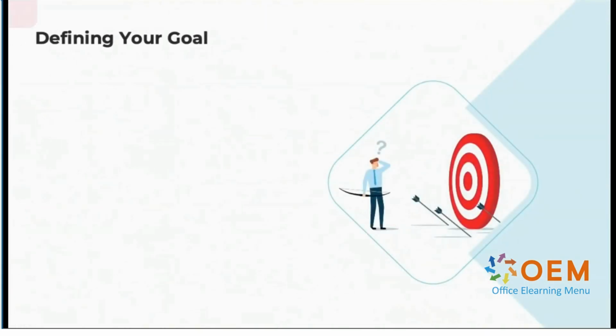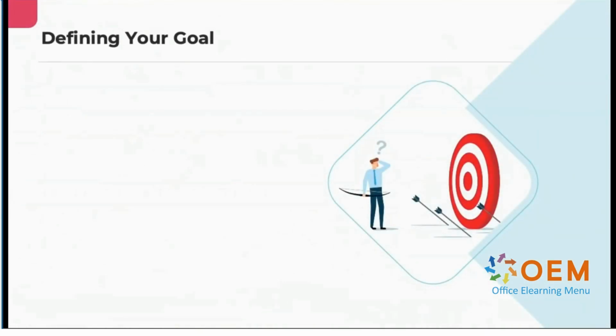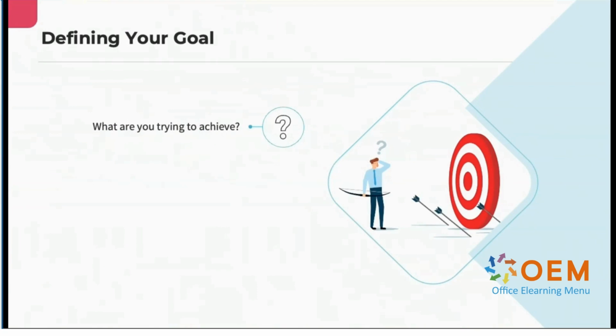One of the hardest parts of impact mapping can be getting started. To do that, you need a business goal. This might sound easy in theory, but in reality, it can be difficult to define just what you want a product to achieve from a business standpoint. This is not the time for mission statements or generalities, which have their place but are not specific enough for impact mapping. To help, consider following the SMART framework.